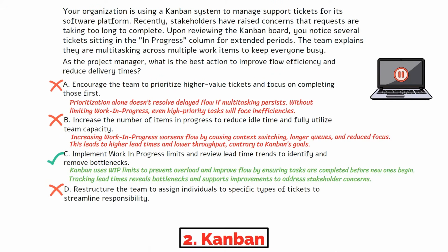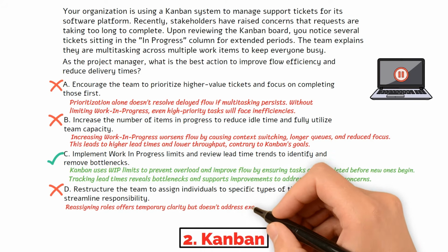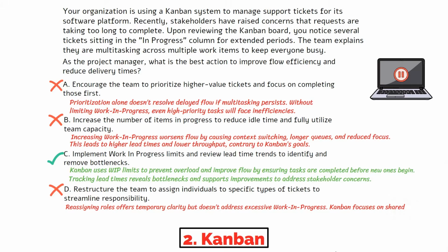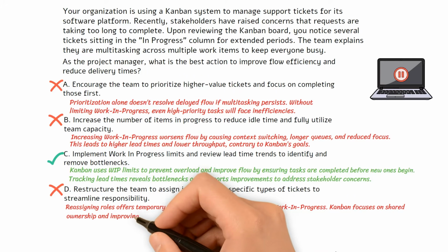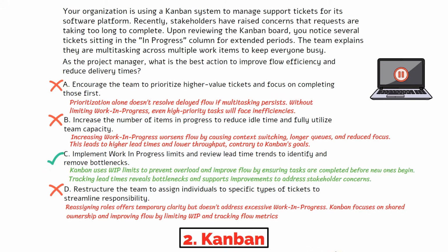Choice D is incorrect. Reassigning roles may provide short-term clarity, but does not solve the systemic issue of too much work in progress. Kanban emphasizes team-wide ownership of flow, not rigid role assignments, and the real opportunity for improvement lies in controlling work in progress and monitoring flow metrics.